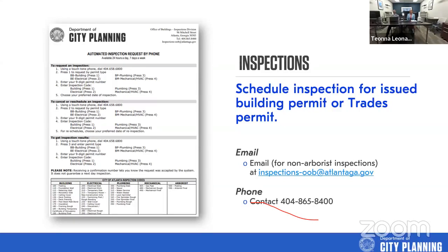The inspectors have 2 days to review the report to make sure it's valid, meaning it's from an inspector that has the license to conduct that specific inspection type. So you cannot have a plumbing and mechanical inspector conducting an electrical rough or electrical final inspection. We'll follow up and look at those as well.